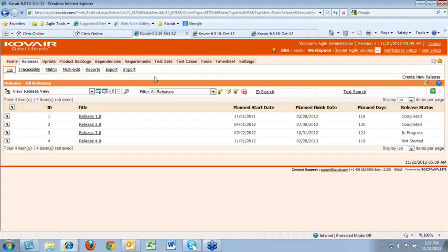For example, let's say while implementing a user story, there could be some dependency factors which are involved while developing a particular user story. Those dependencies could be some components that we are getting in from external vendors, or could be internal or other groups. So we are tracking those under the dependencies entity. There could be some additional requirements apart from user stories. For example, the requirements with respect to data, the benefits. There could be some other non-functional requirements as well, which we are tracking under requirements. And in the process of time, we can link these dependencies or the requirements to the user stories or the product backlogs.